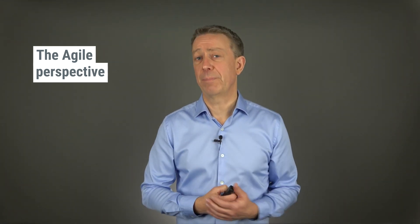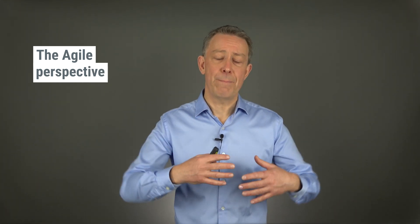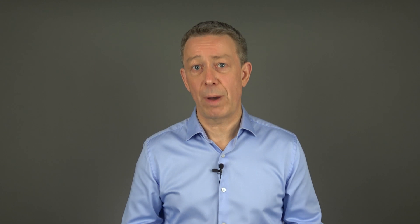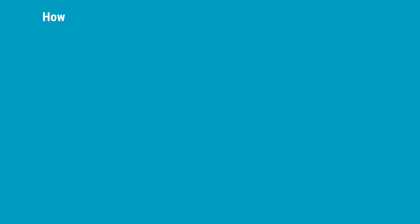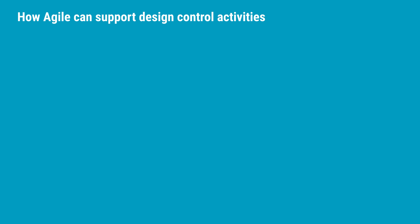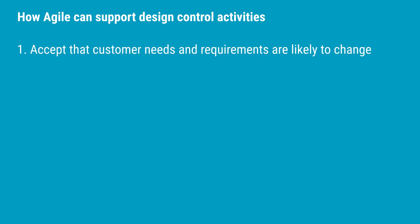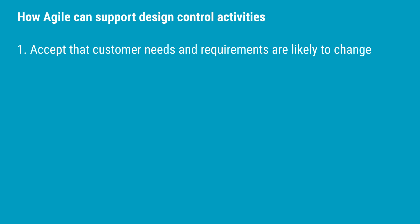Agile development methods were created due to a poor match between software development and traditional project management methods. If you develop a user interface with many user interactions, it is challenging to define all requirements before starting the work. Even if you try very hard, the end result might not match expectations because stakeholders tend to change their minds when they reach the look and feel phase. In TIR45 this is stated as: customer needs and requirements are likely to change. Agile embraces changes, making change management integral to an agile development process.